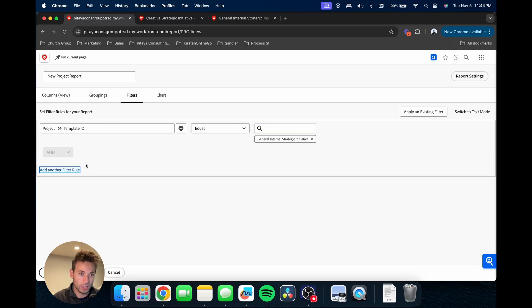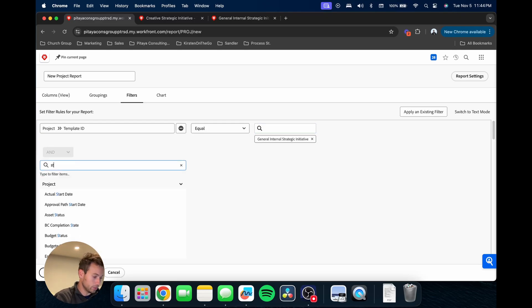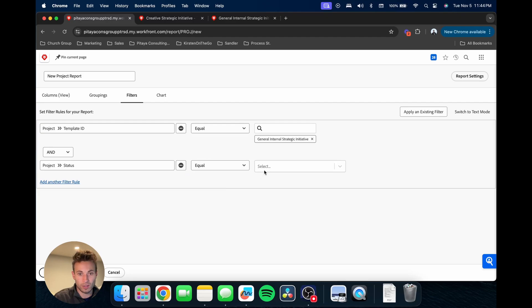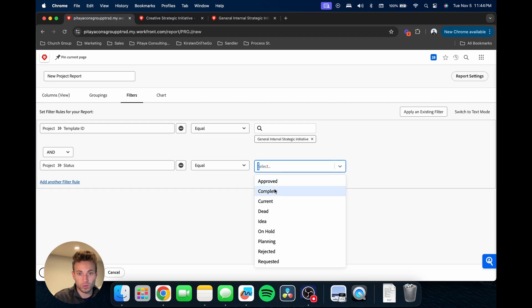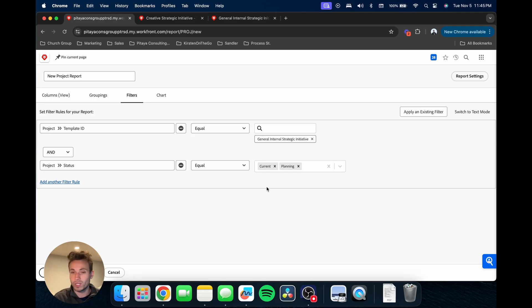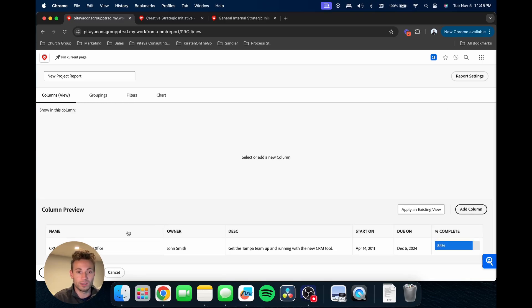Another filter we're just going to do is project status equals current or planning, basically filtering out any completed or dead projects or anything else. For now that'll be good for our filters.